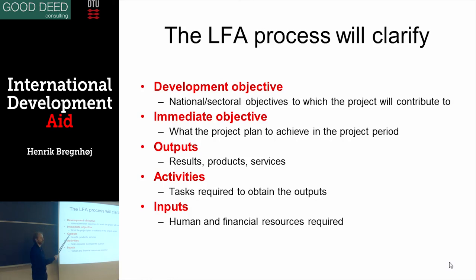You also have some outputs. This is more tangible. The outputs are leading to the objectives. For example, you have a number of water points set up, you have some sanitation established, then you could expect that people are using it or are more healthy or whatever you do here. So there are some outputs, then there are some activities, what are you going to do? Combined with a time plan, but activities, and then inputs, that is all what you need in order to get the project done.